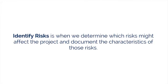The second process is Identify Risks. This is when we determine which risks might affect the project and document the characteristics of those risks. This process has many inputs and lots of tools and techniques, which is important to note because when we work on a project, our objective is to identify all risks. We can identify more risks only when we look at the same project from different perspectives. If we use a variety of tools, we will identify more risks than we would using a single tool or technique like brainstorming.